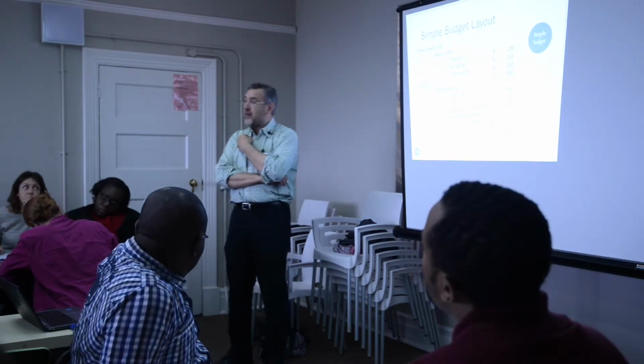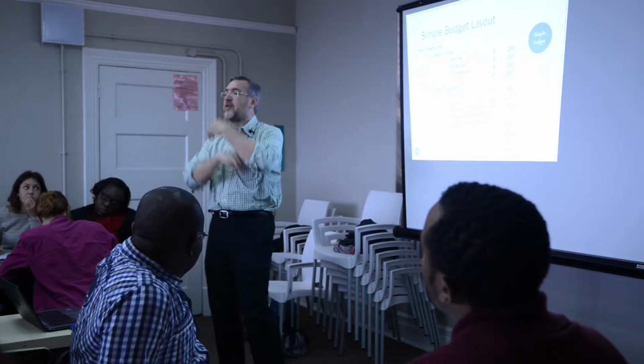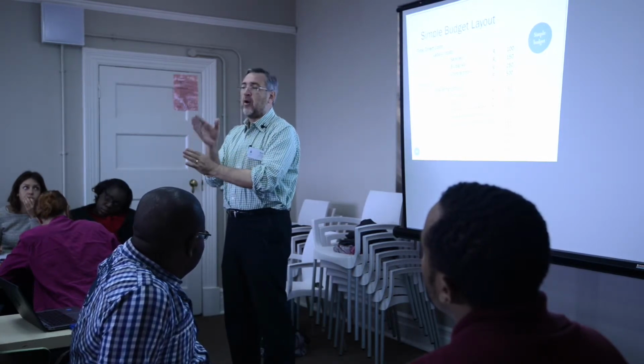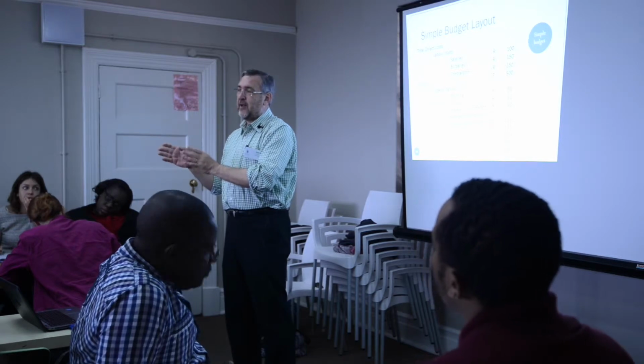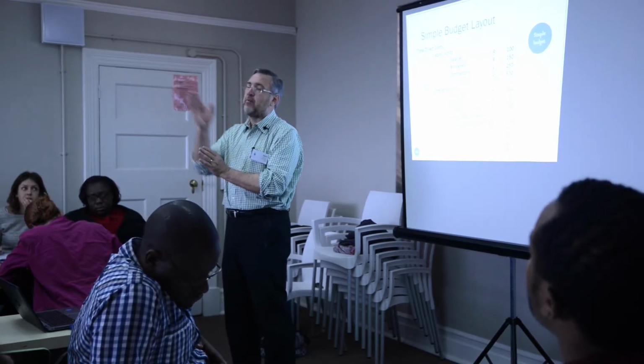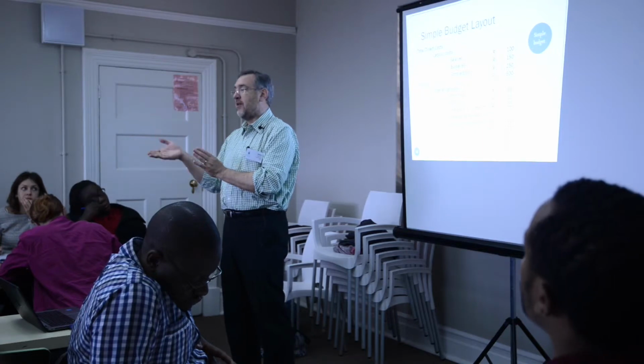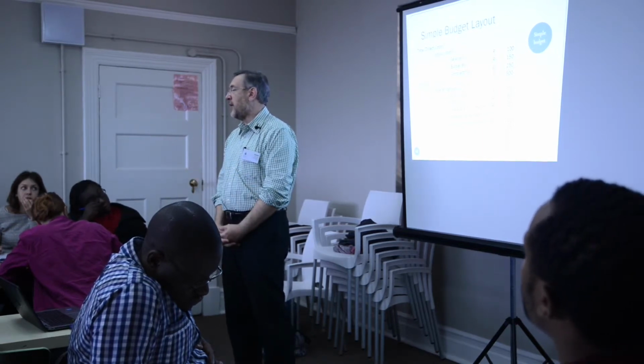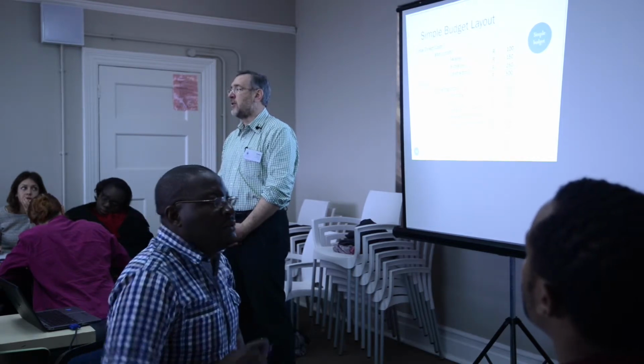So some funders do that. They don't give you the whole lot up front. They give it to you on milestone delivery. So hence again, Gantt charts are very important, because you put those milestones in your Gantt chart, and then when you've agreed that you've delivered it based on your report, then they release the next tranche of money. So yes, that is another way that funders hold you accountable and get the projects completed. So not all funders do that though.